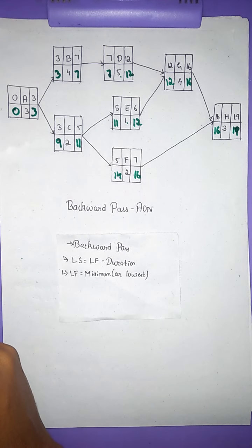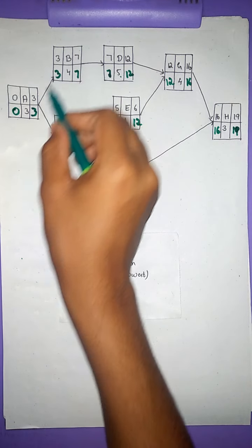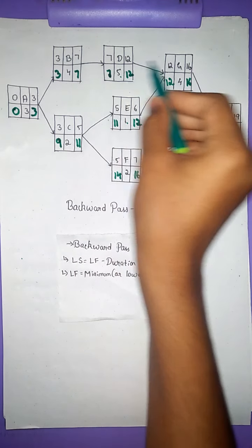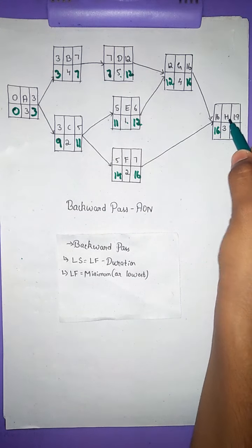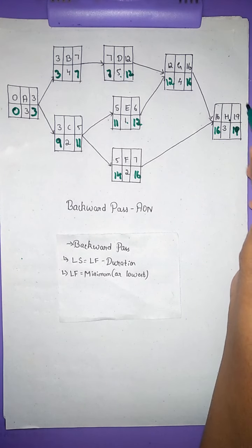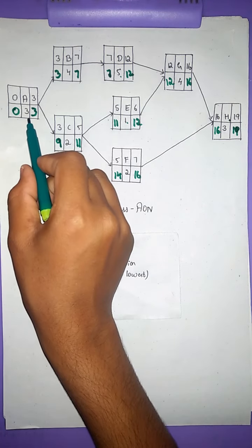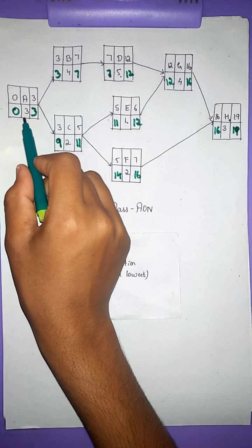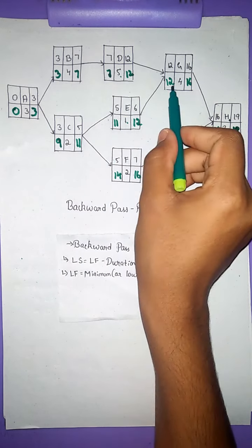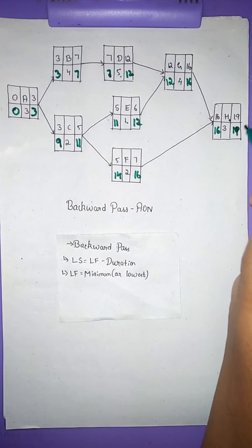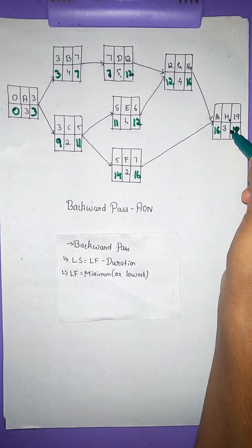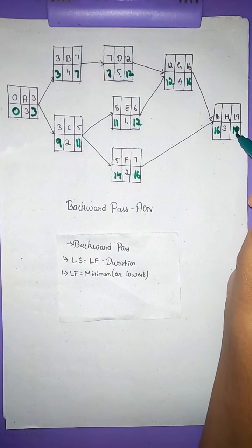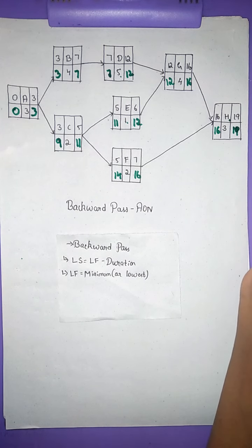By looking at this, we can tell that A, B, D, G and H form the critical path. Not even a single day can the schedule be varied. The schedule that has been given for these activities has to be followed on the same day. If it varies, the schedule may get extended or the information may go wrong.